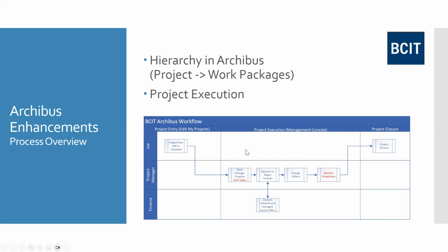Bottom line, when Archibus was first implemented a couple of years ago, BCIT was using templates for projects, setting them up and passing them off to project managers. Those templates were analogous to templates that you'd see in Word. So instead of having to type a Word doc out every time, you can use a Word template. Same thing with Archibus. We had templates for 0 to 3 million, 3 million to 10 million, and over 10 million. The efficacy of those for project managers having to go through and clean up and tidy up extraneous work packages wasn't a great use of time. So we've moved away from those templates.